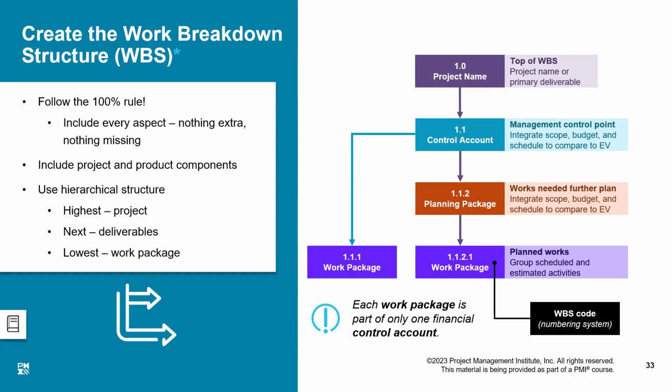The people who are dealing with accounts will say, which work package have you done? I will not tell you the name of the work package. I will say, I have done 1.1.1, and that is sufficient for them. They say, okay, for 1.1.1, we had this much budget available. How much have you spent? So this is how we refer to the work packages.